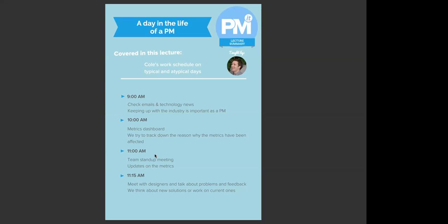They can say, hey, this will take this long and whatnot. And the planning also involves assigning arbitrary numbers to how long it will take to get that particular thing done. And you have that input from UX, that input from engineering, and you have it all to prioritize the backlog. And then you size the stories, and then you prioritize which ones need to go into the sprint. And the startup meeting is when you also kick off the sprint.